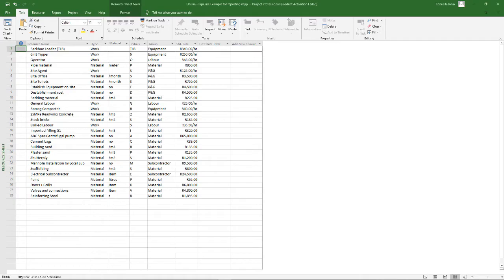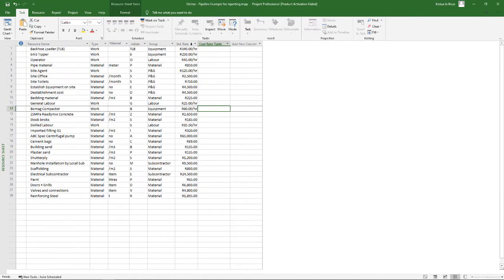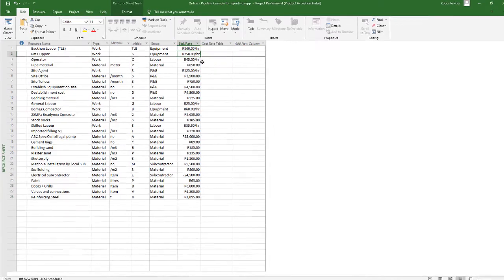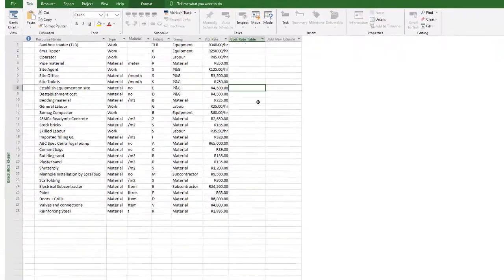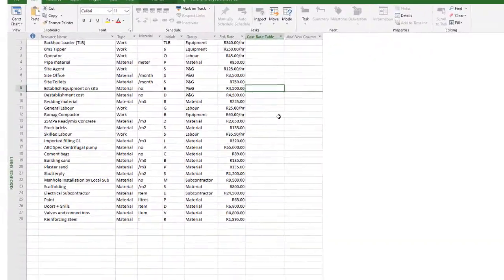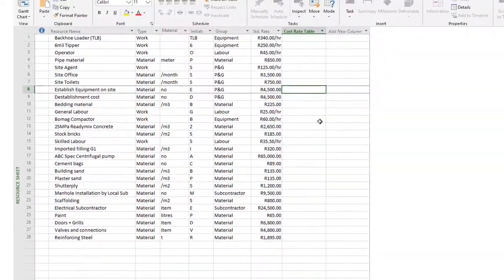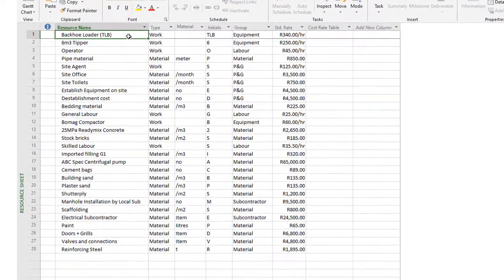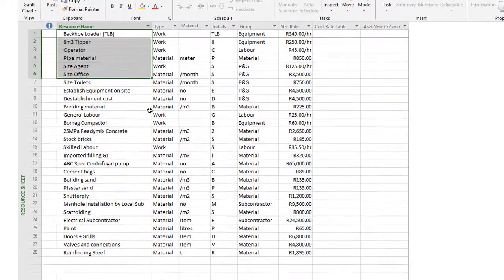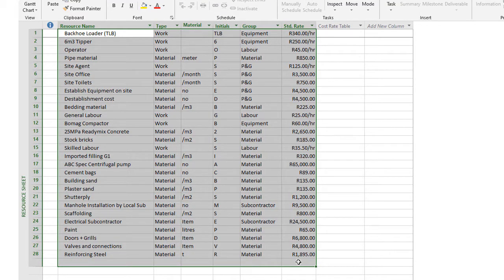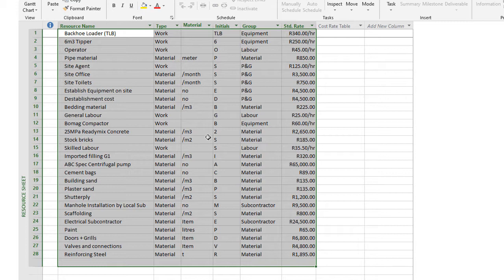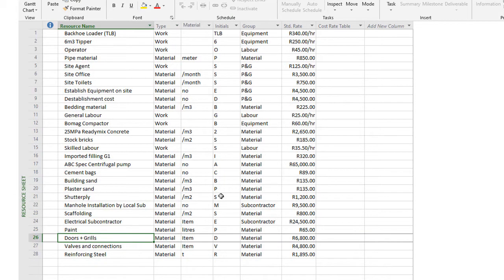Let's look at the process of doing this in MS Project. The first step is simply to set up your resource sheet. Now for the international guys, I'm using the South African Rand here. If you want to do a quick conversion, just divide it by 10 to get an idea of the rates. The beauty of this is that you set this up once. Once you've got your resource sheet set up, you can save that and use the resources in other schedules as well. Don't think that this is an exercise you do each and every time. You do it once and then it's there.